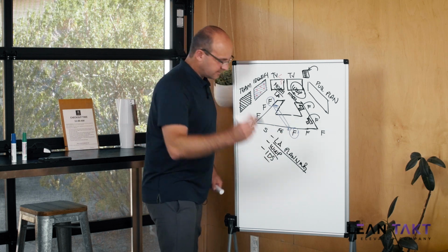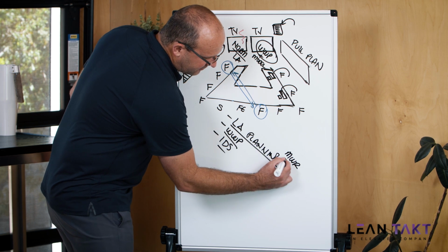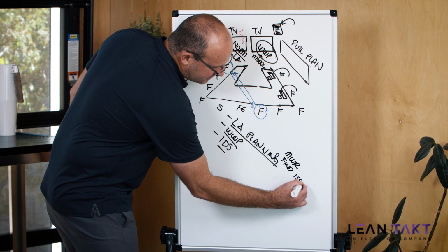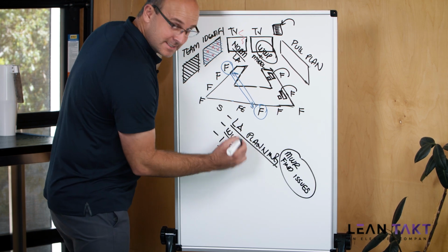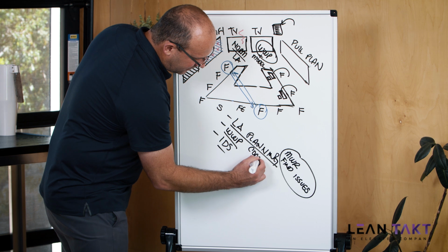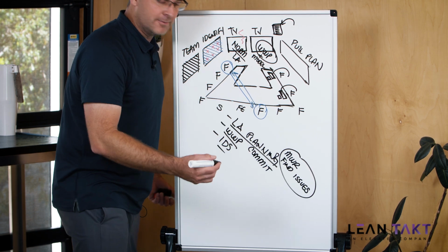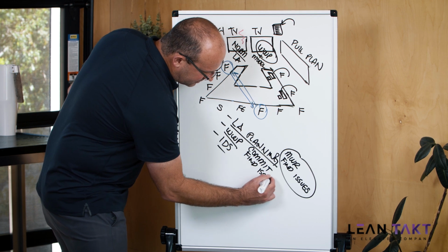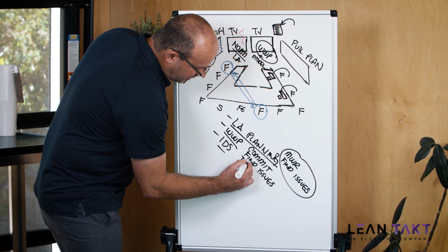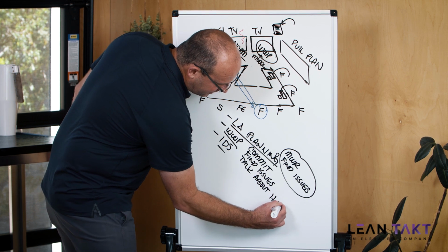So again, the look ahead plan is to make work ready and to find issues that can be solved, okay? The weekly work plan is specifically to have the trade partners enjoy an environment where they can commit, and then obviously find issues and talk about, and I'm just going to say handoffs, okay?